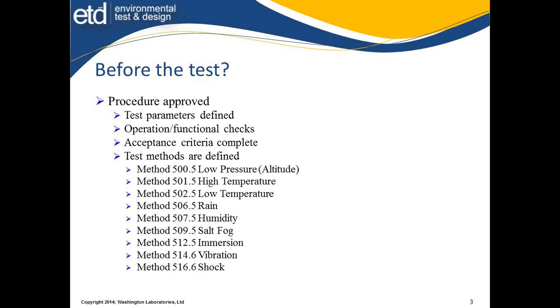Here's the problem. This procedure may be approved, and then it comes to the test lab to execute the test. Nobody's communicated to the lab prior to that, so they're not very conscious of what's in here. It's up to them at the last minute to read through this and understand everything. Sometimes this can be a problem. If you have a procedure approved, by all means get it in front of the test people, the people that have to execute. They need the opportunity to do this.